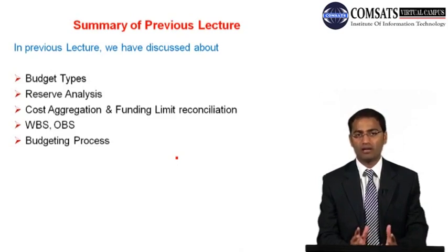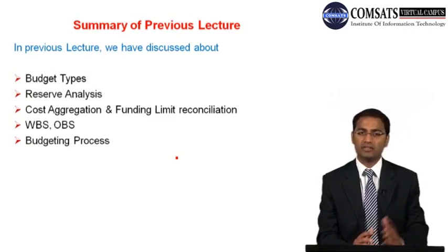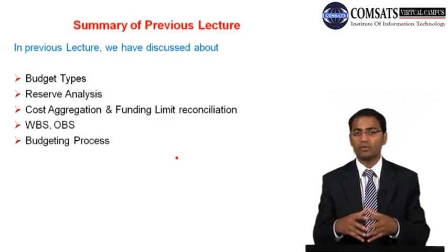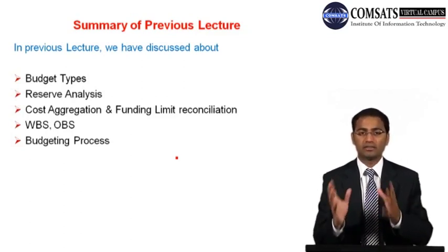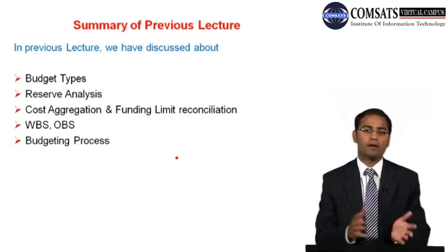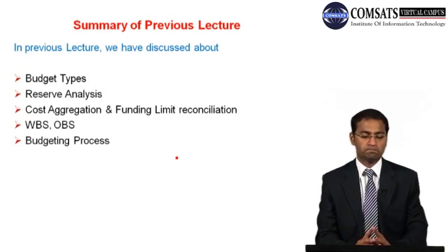Say for risk number 1 you had kept 10,000 rupees, and the activity has been completed, so the risk cannot happen now, as this risk existed because of that very activity. Now the activity is gone, so the risk is gone, hence the reserve we kept for that particular risk should be returned back to the management.